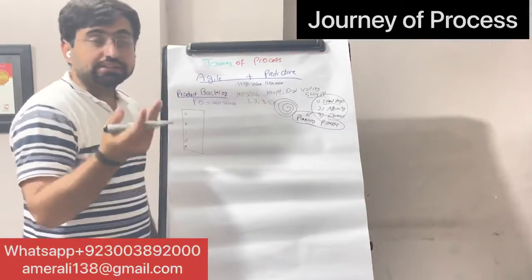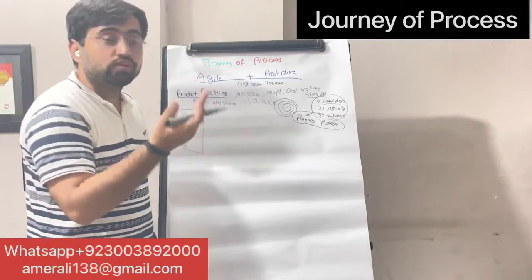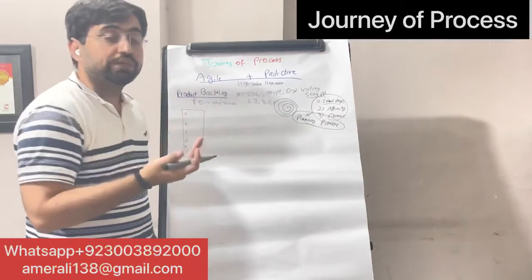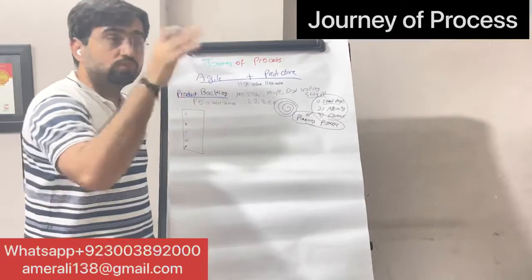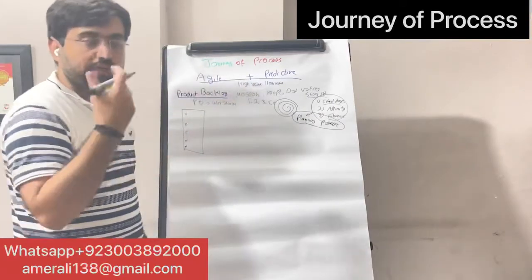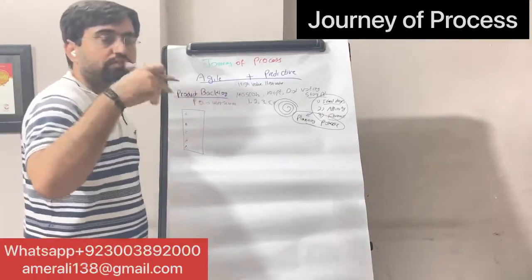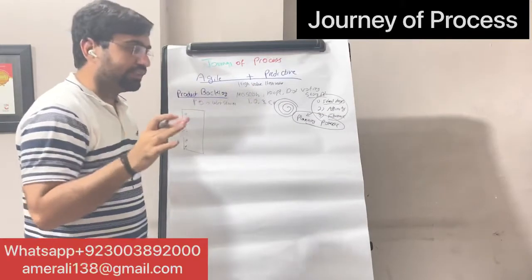Let's say 2 people have a conflict on the user story, then they give their opinion. Why do they think this should be the story point? Then they go to round 2, round 3, round 4 until they achieve consensus.